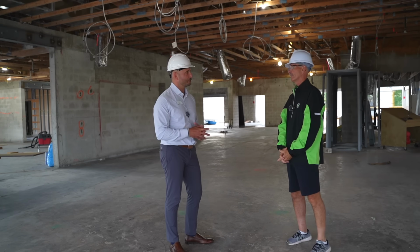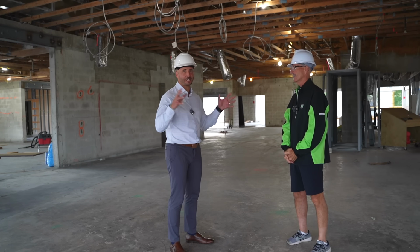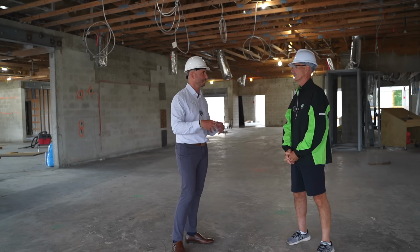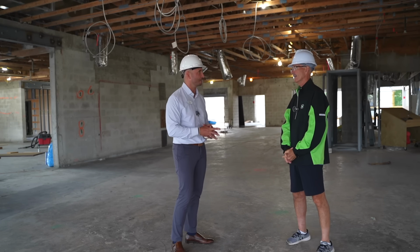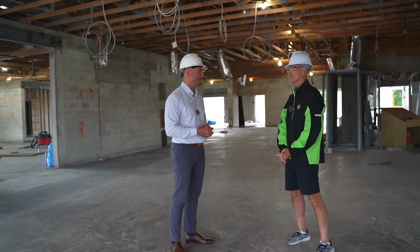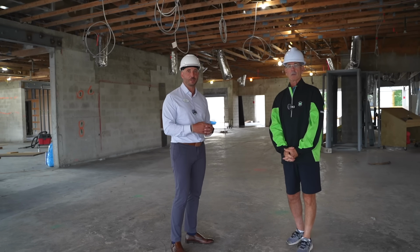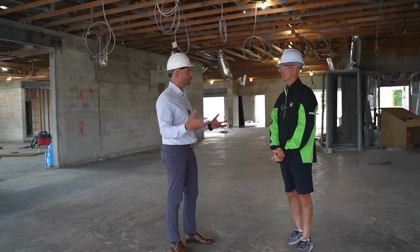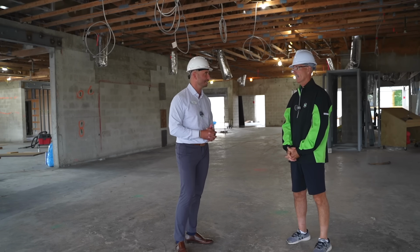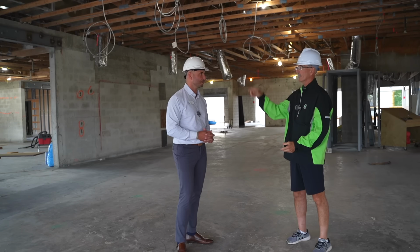Well, and we've told Charlie that it's got to be done by October 1st, because we're trying to get all of this work done before the activity increases around the club with golf and whatnot. So he's confident he can still hit that date. But for those of you who have been here and have seen firsthand, everyone said, wow, that's an awful lot more work than we expected. Well, we have over $1 million in site construction, excluding pickleball and parking across the street.